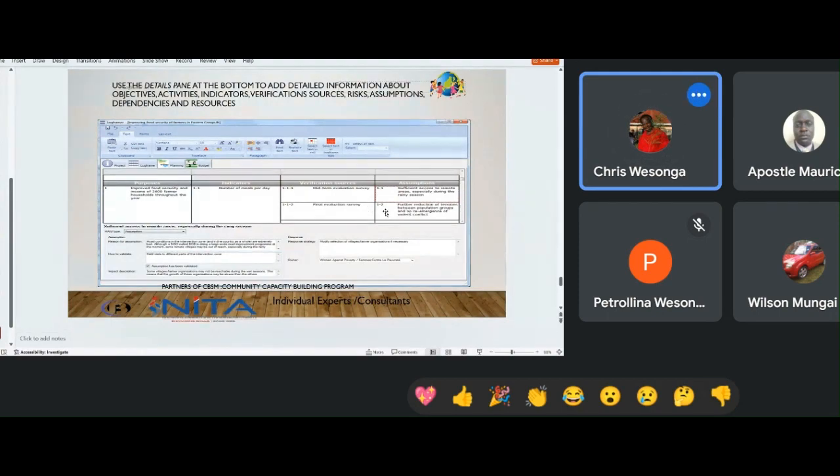If you look at this example here, I've shown it highlighting an assumption. Once you highlight it, it brings up another dialog box below the whole logical framework, and it gives you the risk type, the assumption, the reasons for that assumption, how to validate the assumption, the impact description, the response strategy, how you are going to respond, and who will be the owner. It happens that for every indicator, every means of verification, every assumption, and when you go to the goal and the activity, it always adds another dialog box